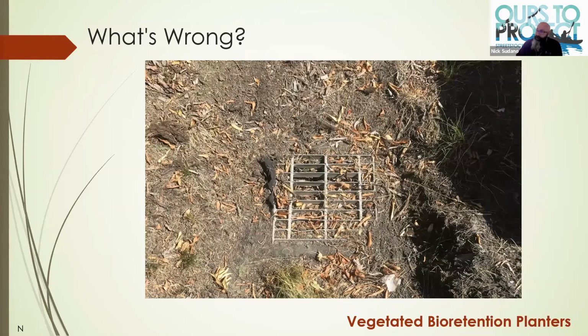For those of you contractors out there, make sure you remove your inlet protections. This filter fabric, for one, is installed incorrectly. We want to see this over the drop inlet, not under the drop inlet, because as soon as someone lifts this up, now we have all that debris going into our storm drain system. These are things we look for as inspectors. We're actually out there looking at every single portion of these features, with plan sets in hand. And these should be part of your maintenance checklist for each of these features as well.